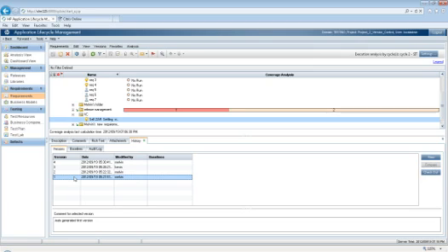So the differences between versions, version 1 and version 2, especially for sign-off, can be highlighted by you creating an additional field called sign-off. That particular field can only be changed from value 0 to value 1, or from not signed off to signed off by a particular person from your team. So in your case, you have John, who needs to sign off SRS 1.